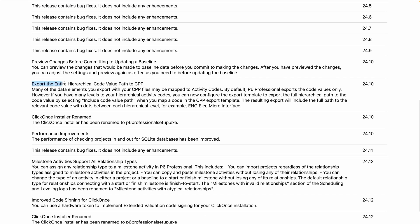Export the entire hierarchy code value path to CPP. This is probably for a very small subset of users — CPP is related to people working for the Department of Defense. It's a certain format used to extract data from P6, and additional data elements will now be part of that export. Thumbs up for those working on CPP-type projects.